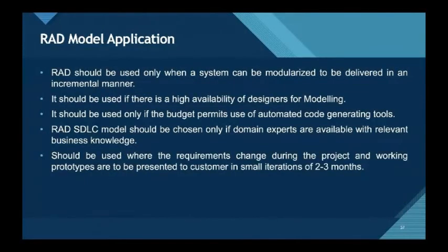RAD model application. RAD should be used only when a system can be modularized to be delivered in an incremental manner. It should be used if there is a high availability of designers for modeling. It should be used only if the budget permits use of automated code generating tools. RAD SDLC model should be chosen only if domain experts are available with relevant business knowledge. Should be used where the requirements change during the project and working prototypes are to be presented to customer in small iterations of 2 to 3 months.